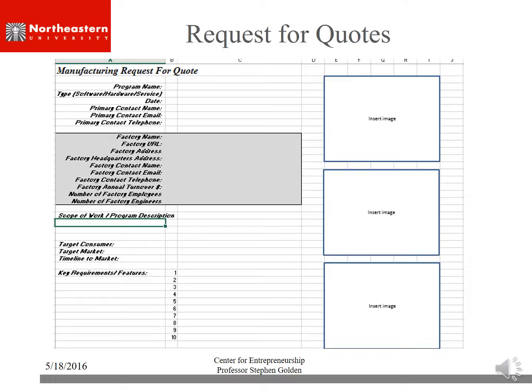So only provide as much information as necessary. Try to get an NDA. Only provide as much information as necessary for them to give you an effective quote. Avoid telling them that you're a student in a university working on a project, and I suggest you use volumes of 10, 20, and 50,000 units over a 12-month period and get a quote on that. And again, you can extrapolate from that to get to whatever number that you really think you can do.